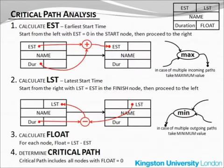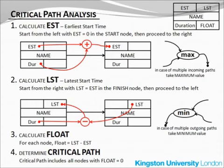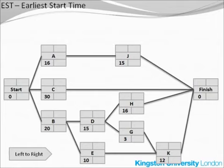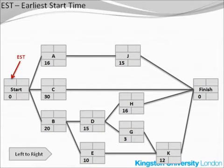We will now calculate the earliest start time, or the EST, for each activity. This calculation starts with the start node, goes from left to right, and finishes with the finish node. The EST is normally shown in the upper left-hand corner of each activity box. With the start node it's easy — the EST, the earliest start time, is always zero.